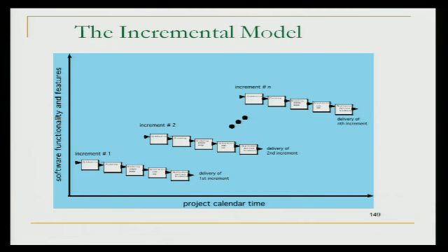You don't confuse incremental with iterative. You don't go into an incremental development approach saying, I don't know how many increments, I'm just going to wing it, and eventually I'll stop. With increment planning, you actually have an idea of how many increments you want to have, okay? And what you do is you map requirements to those increments.